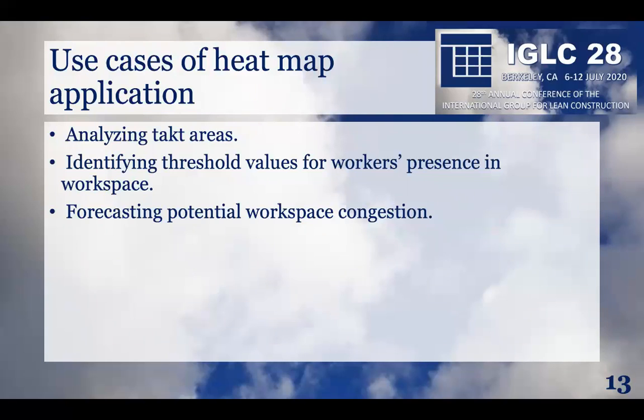And second is to identify threshold values for workers' presence in workspace. Our previous research has proposed the concept of a threshold value for uninterrupted presence on site, where we argued that a worker needs to stay at the workplace for a certain period of time so that it can be counted as an uninterrupted time, which is correlated with value-adding time.